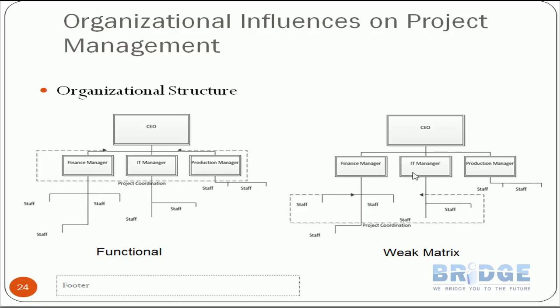Now let's move on to the weak matrix organizational structure. Here, the department heads are relieved from project management efforts, and we pick one capable staff member with some experience to coordinate or expedite the project — called the project coordinator or project expediter. This creates a clear line of responsibility, as people now know where to go for project information.